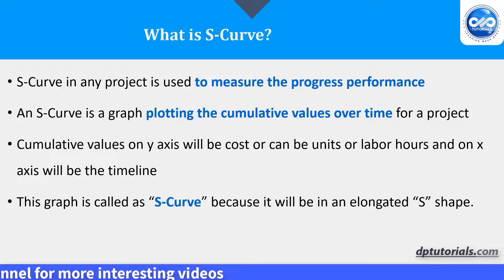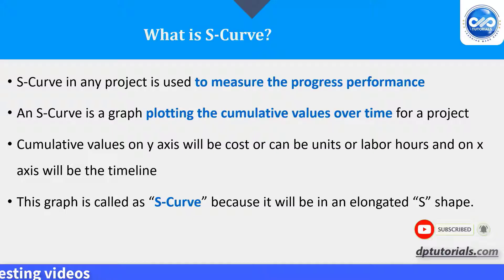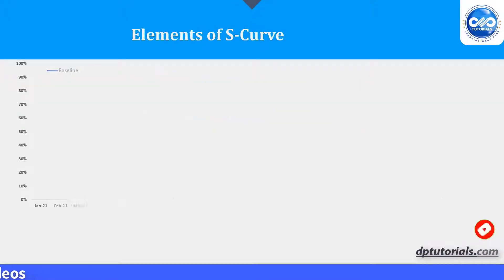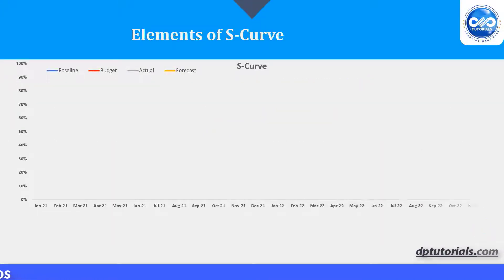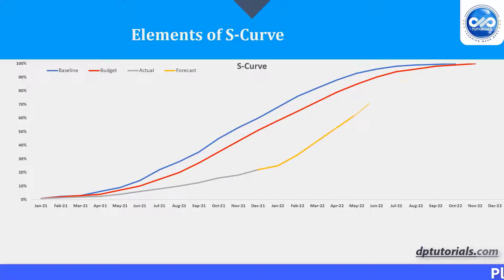You may be wondering why we call it an S-curve. The S-curve often forms its shape because the growth of the project in the beginning stages is usually slow, forming an elongated S-shape as the project progresses.